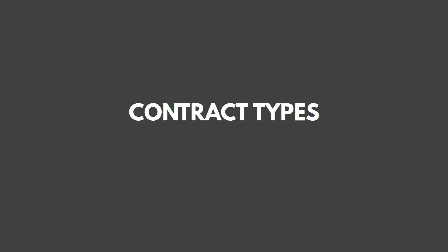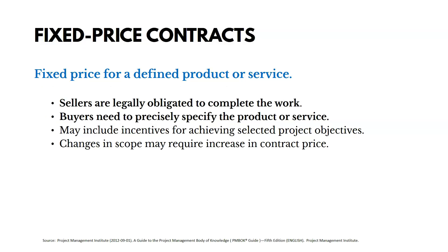Now let's talk about contract types. There are three key contract types: fixed price, cost reimbursable, and time and materials, each with a few different flavors. Fixed price contracts set a fixed price for a defined product or service. Sellers are legally obligated to complete the work, and buyers need to precisely specify what they're looking for. If there's a change in scope, it may require an increase in contract price, because it's fixed price for fixed scope.